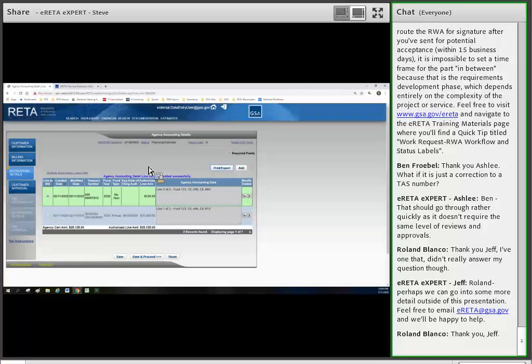But anyway, I just wanted to make you aware of that. You might see that. So, okay, I've entered 2 funding sources here. Great, that's awesome. I can fund my RDV with multiple funding sources. Yes and no. The yes part is, as you can see on the screen, I've clearly added 2 funding lines. The no part is there are limitations downstream with our billing system, that our billing system can only bill one of these 2 lines at any given time.